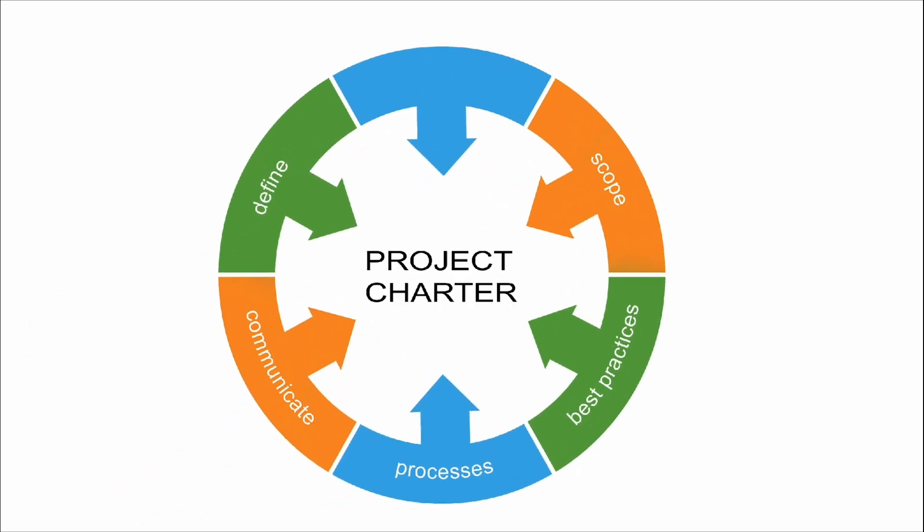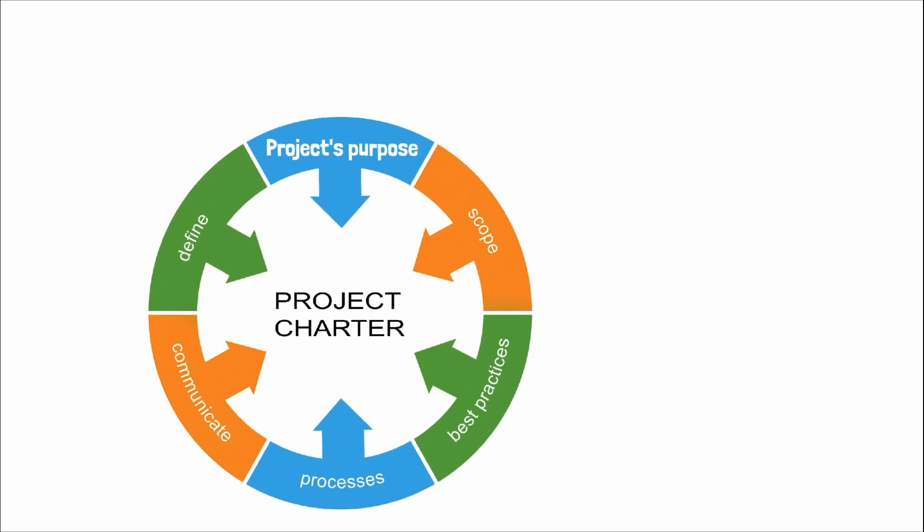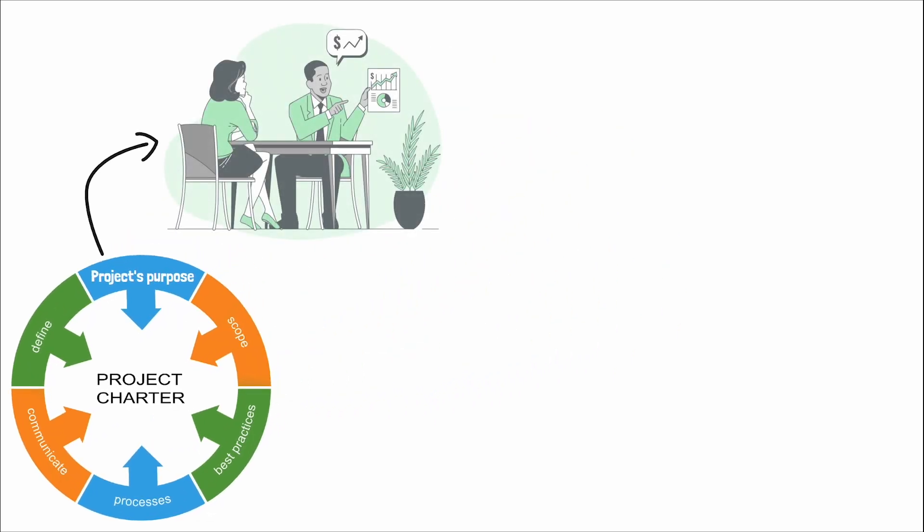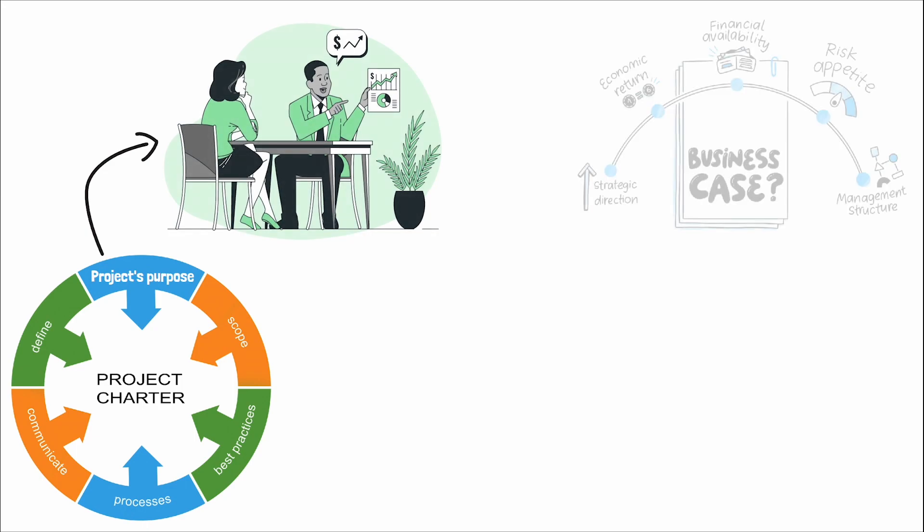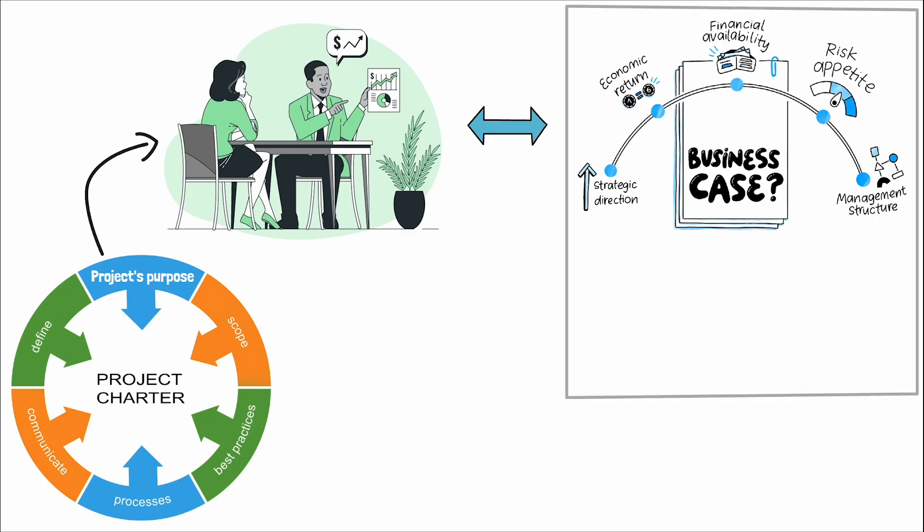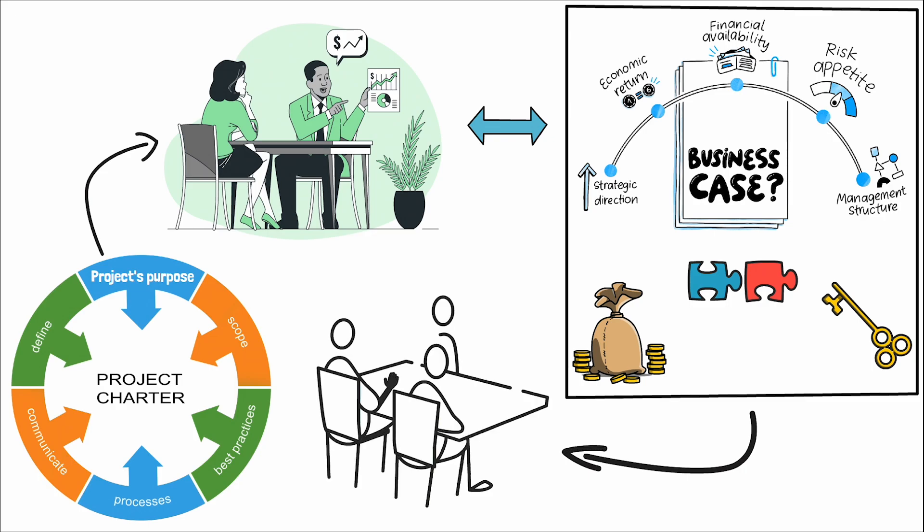The elements of a project charter are carefully chosen to provide a comprehensive overview of the project at a high level. These elements include the project's purpose, which clarifies why the project is necessary, often linked to a business case that summarizes the benefits of a selected component. The business case is vital as it justifies the investment in the project, describing the problems it intends to solve or the opportunities it aims to seize, thus serving as a basis for authorizing further project management activities.